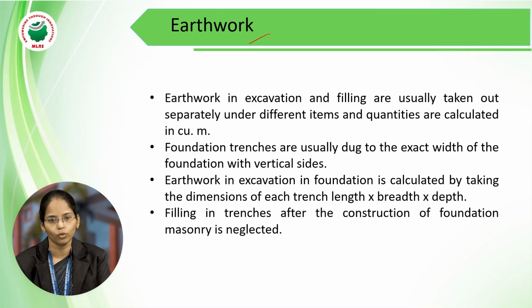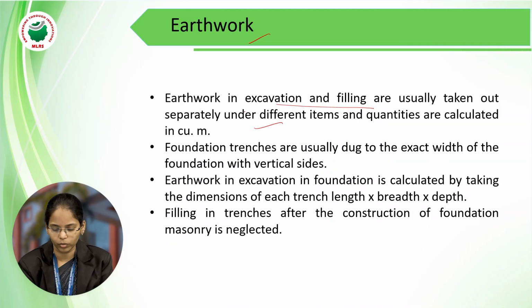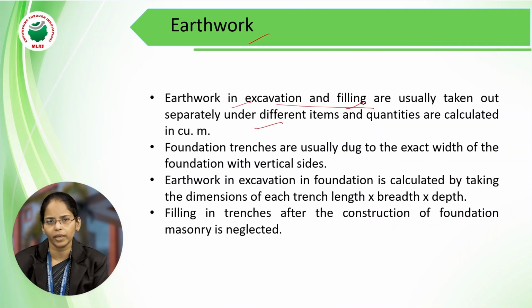So first one, if we go for earthwork, excavation and filling are usually taken out separately under different items when we prepare an estimation. In earthwork, what are the items we need to describe there? First one, earthwork in excavation. Then earthwork in filling. These two are separate items which we consider while preparing an estimation.